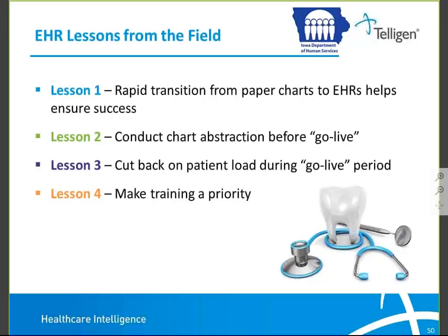Lesson 3, cut back on patient load during your go-live period. This is very important. Yes, it's going to be a little challenging for those days or potentially weeks, depending on your particular office, in terms of cutting back on patient load, but it's important. It's going to take your staff and your dentist a little longer to get through a patient visit because you're putting information into the system and figuring out those new workflows. So do make that sacrifice to cut back somewhat on your patient load during your go-live period.